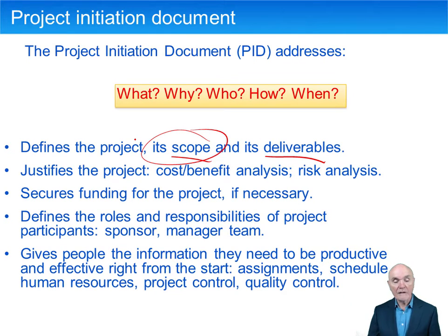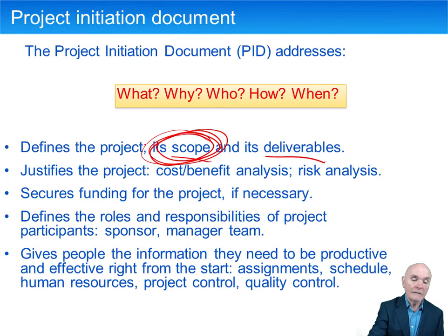So if, for example, someone suddenly comes out with a really good idea, it'd be very useful if we had a different report. It's going to cost money to generate that report, to change the software and so on. And rather than just saying, yes, you can have that report, we should go through and say, well, it's going to take 5 days of programming to produce that report. What's the sort of benefit we're going to be getting for that sort of expenditure? What's the risk in beginning to alter computer software once it's partially made?